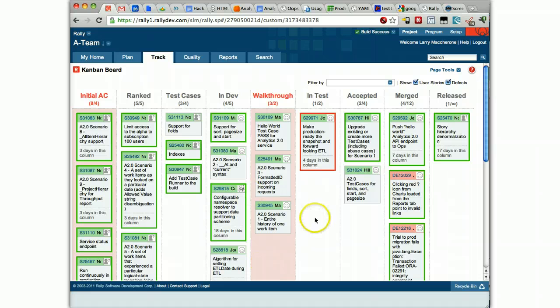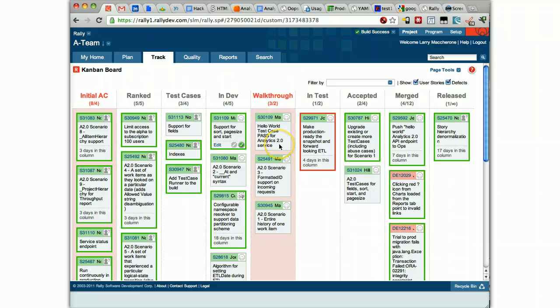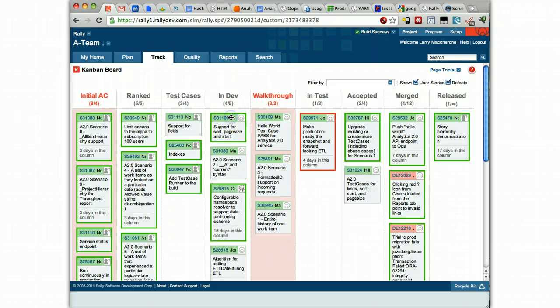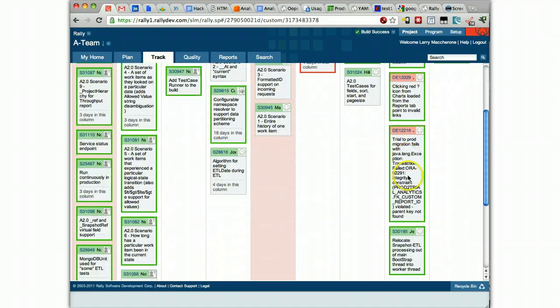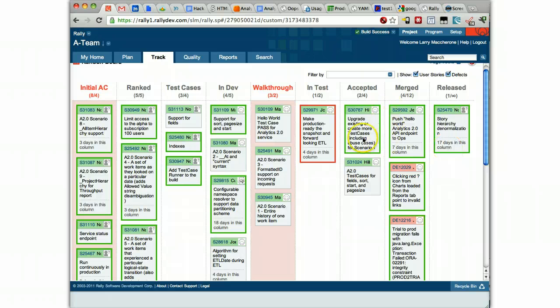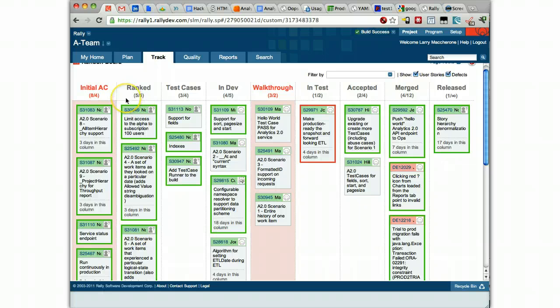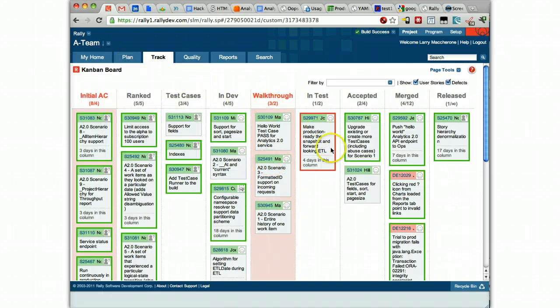So this is the team's level board. They have these things in dev. When you mark this check box there that says it's ready, then the next column can pull it in. And we encourage the team to work from the right to the left. These things here are all ready to go out this weekend. So they're all merged and they'll move to this column when the release goes out on Saturday. This is stuff that's accepted, but this one is not accepted yet. I'm still talking to the dev, trying to figure out whether or not there needs to be another story written to split some of this work out.